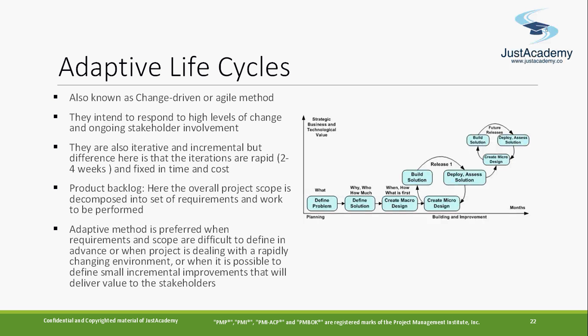In the first month, they take 10 user stories, 10 requirements, build them, test them, go live and go to production also. Users can use that product from there itself. If they want any bug fixes or improvements, it has to go with the next sprint or be taken as a new requirement again. So 10 requirements in the first sprint, 20 in the second sprint, 30 in the third sprint. You take the requirements and deliver them. This is how it works.